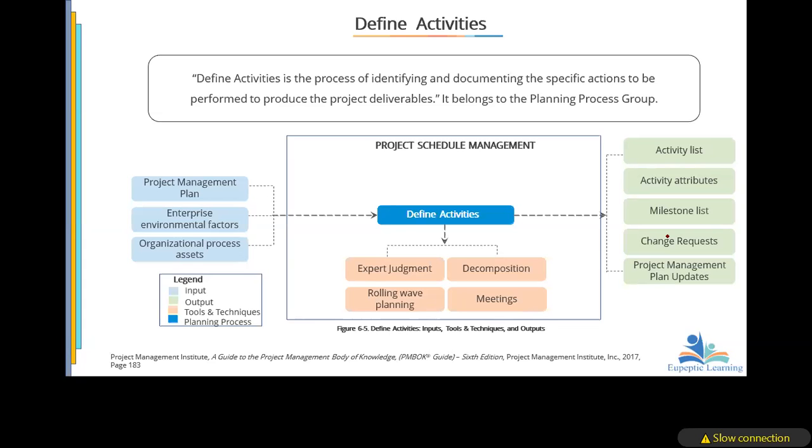At that point, there's no need going to the change control board to make the necessary changes. It's a mistake that you have noticed, so quickly you correct it. But if there's a change that is going to impact the project schedule and all those things, then you go through the change control board. Exactly. The questions are very cunning, so you have to be very careful.